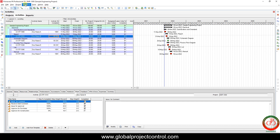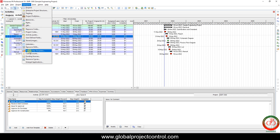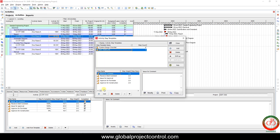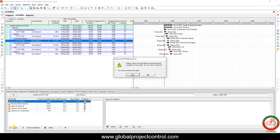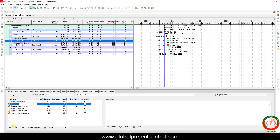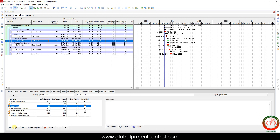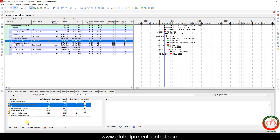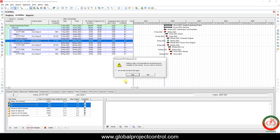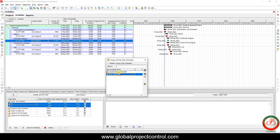On the Enterprise menu we have Activity Steps Template. When we create the template, we are going to implement these steps for each of the activities. If the steps are individual, we need to add them ourselves — for instance, Step A or Step B. But if the steps are not special, you can add them from a template, and all the steps will be added.